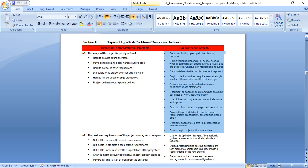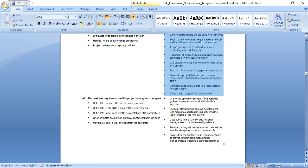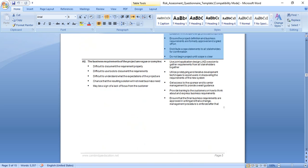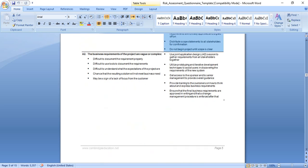Ask project sponsor to make decisions on conflicting scope statements. Document all scope assumptions. Use pictures or diagrams to communicate scope and options. Establish firm scope and distribute scope statement. Don't begin the project until scope is clear. Let's stop here for this lecture and continue in the next lecture.